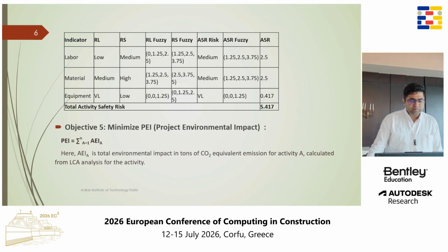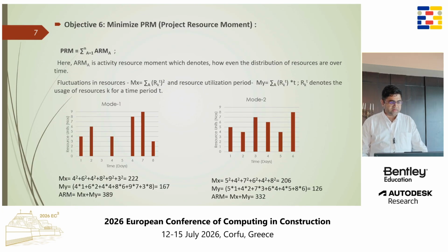Then we move to project environmental impact, because we want to ensure that the mode we choose leads to lesser carbon dioxide emissions. An LCA was performed to understand the total CO2 equivalent emission for every mode of that activity. Then the sixth criterion is that we want to minimize the project resource movement.